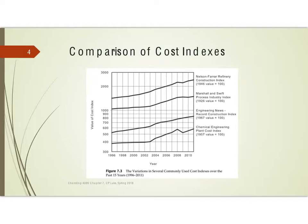Now these indices were all started at different times. Nelson-Farrar started in 1946, and that's when they set a value of 100. Marshall-Swift started in 1926. The CEPCI started in 1957 with a value of 100. And you can see here in this picture that it's up over 500 — and in fact it's quite a bit over 500 today.